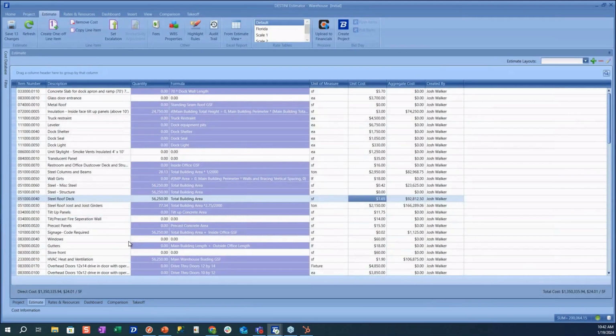So as we see these types of templates and their benefits, it allows a consistent questionnaire. So as a more senior person comes in to review that estimate, they know what the order of the questions is going to be, and they also know the line items that they're tied to. A more junior person can fill that information out, progress that conceptual estimate a good distance, and then have it easily reviewed by a more senior team member.